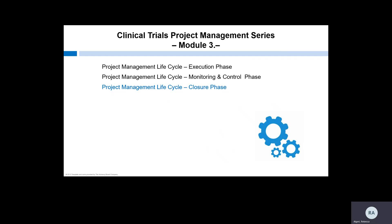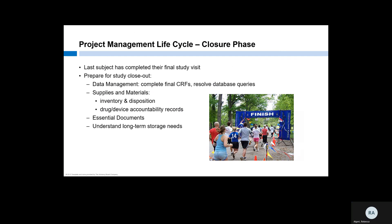Finally, we've reached the closure phase. Closure starts when we have finished last subject, last visit. All subjects are off study, no more visits are happening — we can see the finish line. We need to wrap up the final action items of the execution phase to get ready for closeout. Make sure all CRFs are complete and queries are resolved. Review remaining inventory of study supplies and determine what should be done with the materials. Make sure drug or device accountability records are in order. Go over the regulatory binder to make sure that all of the essential documents are filed and up to date.